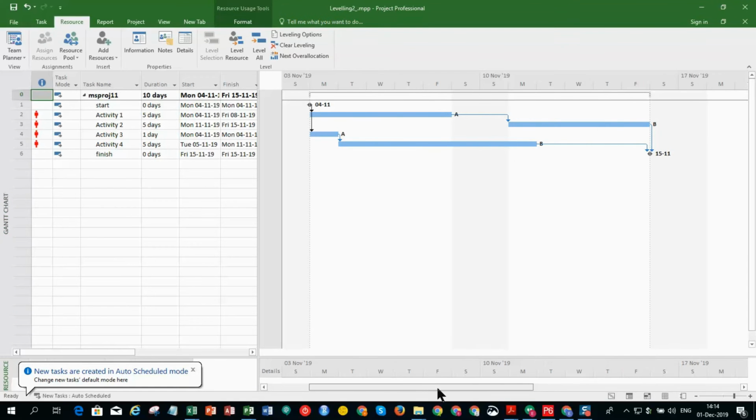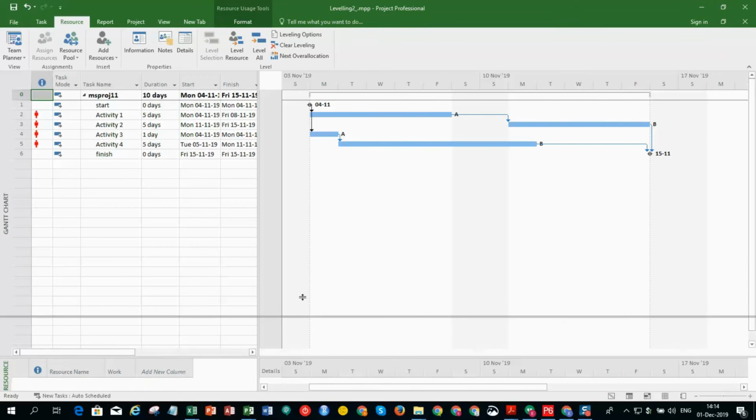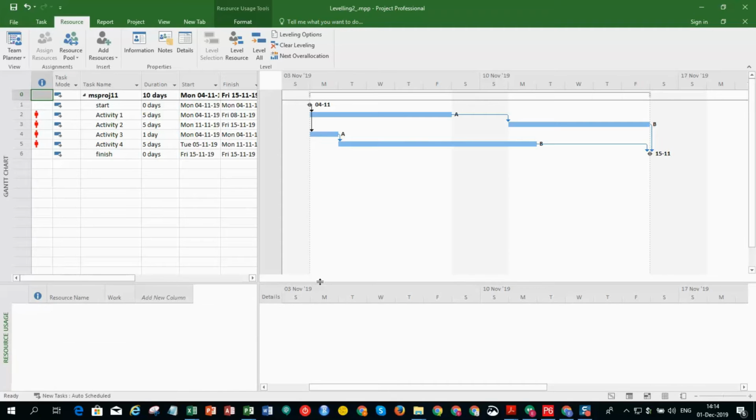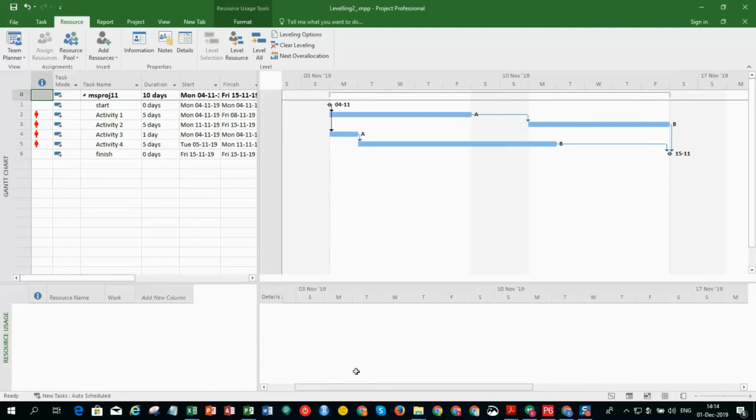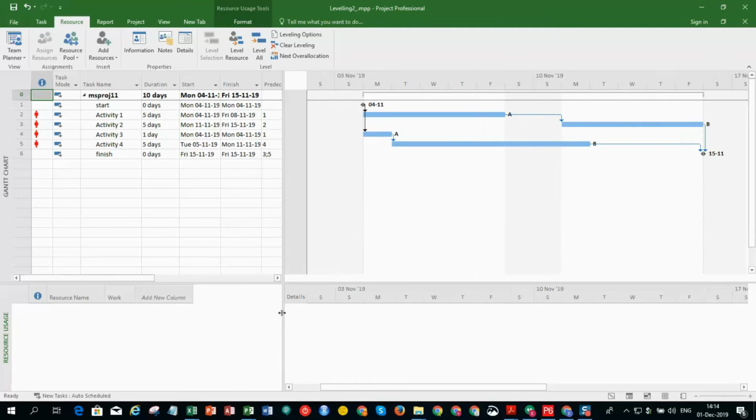The complexity comes when the schedule becomes a little bit more advanced. The situation here is that unlike critical path management, a resource leveling algorithm is not well defined, or at least it is not defined for complex and big schedules.